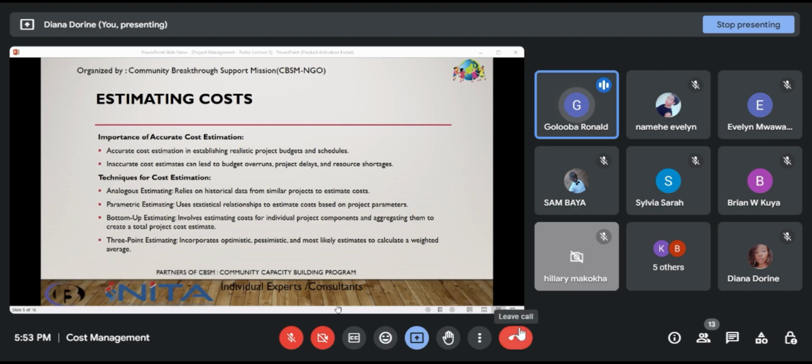This is what is frequently used in project cost estimation, and you estimate the cost based on the work breakdown structure. Those that attended the integration process and the scope management lecture are well familiar with the work breakdown structure and the different formats that are available out there. This allows you to decompose project activities down to the individual level. So with bottom-up estimation, you are looking at individual activities, and you are estimating the costs based on what someone is going to do until you arrive at the cost categories, as you are going to understand them better. So let's move on to the next slide.